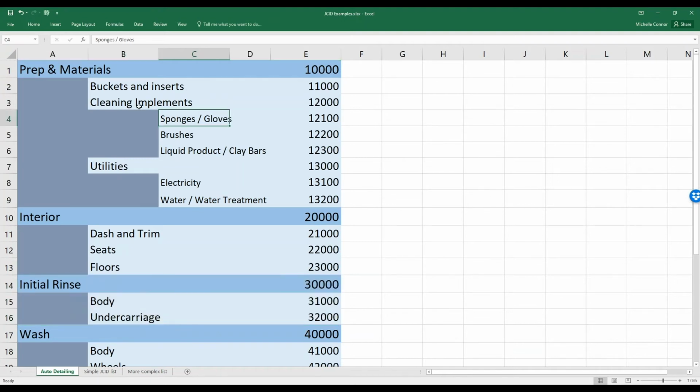In this example, it's a total of 8 different items in my biggest breakdown. But for a lot of you, that might include hundreds of items under one section. And having numbers that very clearly represent that category is going to help you with that reporting and make it a lot easier to see things at an overarching level that are inclusive of the items underneath them, categorized at a child level, and then this being my parent level.